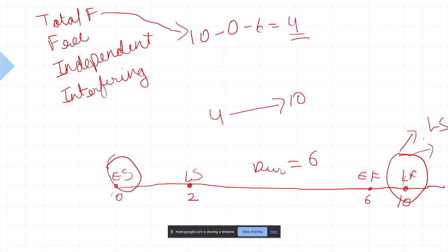So you are forcing the successor activities that they cannot delay, because we already delayed here. So total float is the total scope you have when the work happened perfectly in the previous stage and will go according to your plan in the later stage.